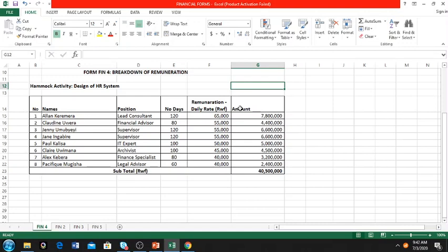So when you have items, unit prices, quantities, numbers, and you have multiplication of all these parameters, we are talking about parametric estimation. You can't do this without parametric estimation, so it is always there.